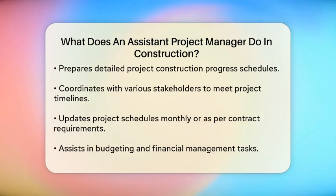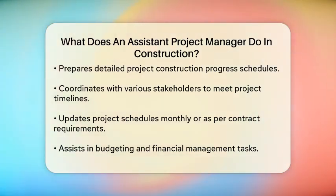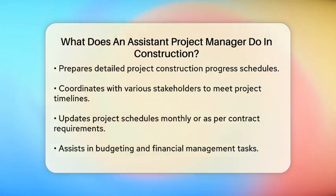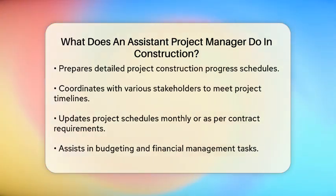Budgeting and financial management are also key responsibilities. The assistant project manager assists in preparing the contract schedule of values, securing executed subcontract and purchase order agreements, and expediting payment from the owner to subcontractors. They also help in preparing change proposals, change orders, and revisions to the master cost breakdown due to changes or management revisions.